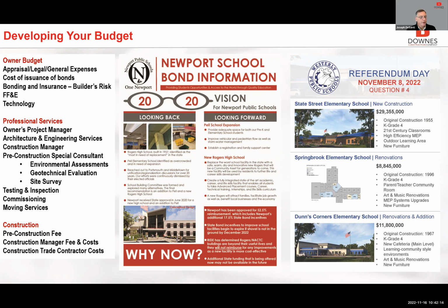And before we talk a little bit about referendums, one of the things that I was thinking about was another important thing that helps you with risk, whether you're in the planning stages or prior to construction, is forensic investigation. So I think it's important, if you go into an existing building, spend the time, spend the money to make sure that you look behind some of those walls, as opposed to assuming something there. Have those design professionals go in and do some maybe selective demo, lift some ceiling tiles, make sure that what you think is there is really there, because it's going to save a lot of time and money in the future.